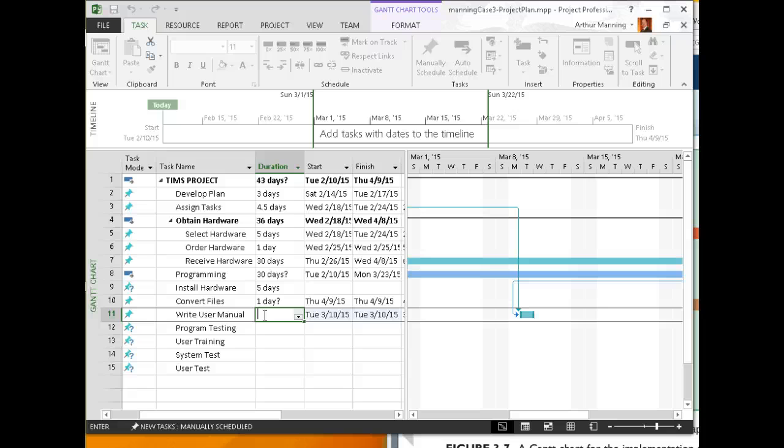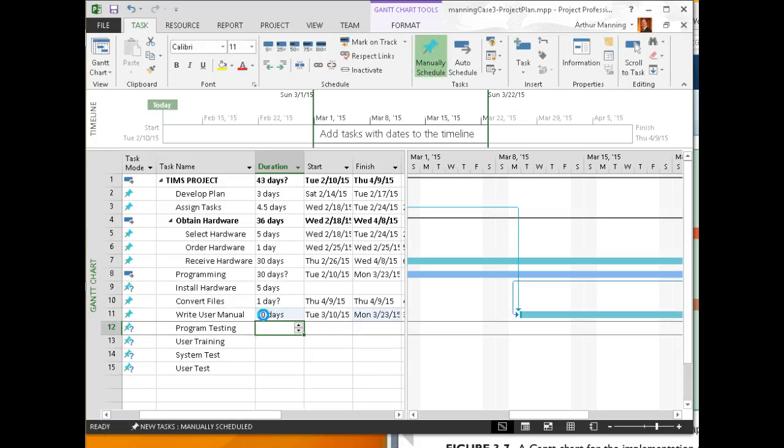I'm going to say 2 weeks of writing. And this is where it gets tough because I can estimate 2 weeks of work, but calendar-wise, it's probably going to be broken up. So 2 weeks, 10 days, 10 man days of work is my estimate of the amount of work.